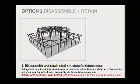Option 2, and this is a diagram of the structural steel frame of the council chamber, would be to carefully disassemble this structure and retain it for future use. Would be salvaging existing materials and completing necessary interior abatement work, and then essentially storing the structure off-site. And the costing associated with that is about $15,000 for disassembly and about $9,000 a year, so $27,000 for up to 3 years of storage. And that's a total cost of about $42,000 additional to the project.